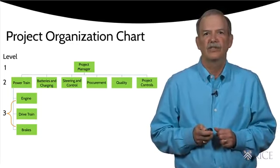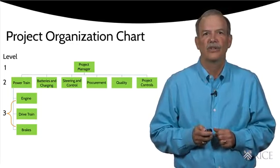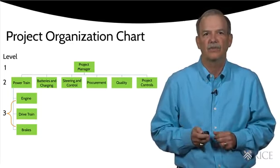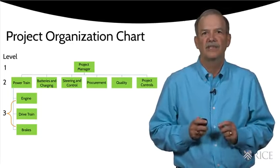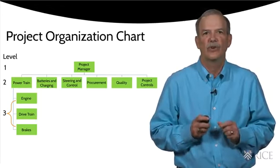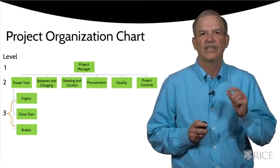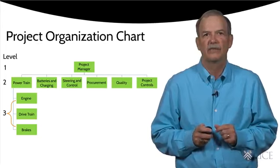Once you decide the functions that go into the project organization chart, then it's time to add names. One name should be assigned to each function on the organization chart so there is a single level of accountability for each function.